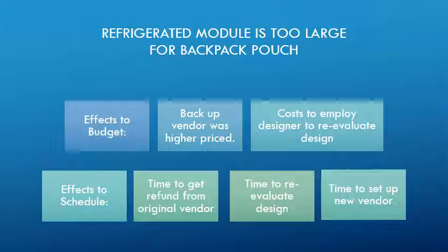Although considering redesigning the backpack could have helped keep the project on track without hurting the project schedule, the workaround, a response to project risk by recognizing an unforeseen threat and creative manufacturing is a viable solution to the problem, was not feasible because of the additional time that would be needed to alter the design, order extra fabric and thread, and readjust the schedule to allow additional time to create bigger pouches for each backpack.